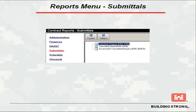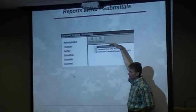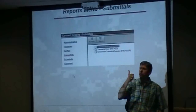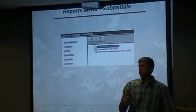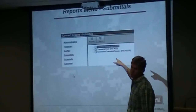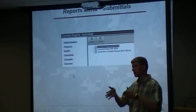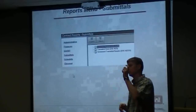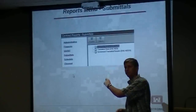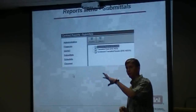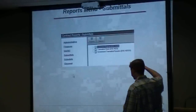Submittals. This submittal register is where you're going to see that. Once you link the schedule items to the open submittal items, the submittal register will be filled out. There are five or six columns in the middle — submittal needed by, approval needed by — and it will fill out those blanks as soon as you link those up. That's where you'll find it.